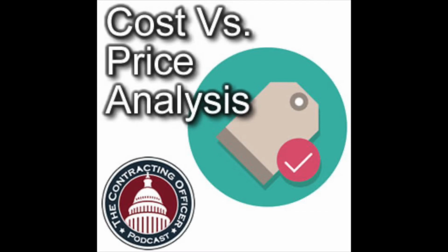15404-1B, lots of FAR in this episode. Price analysis is the process of examining and evaluating a proposed price without evaluating its separate cost elements and proposed profit. Super important. It's so important I had to highlight it in red and bold it, because you don't have to break out the cost when you're doing price. You just are looking at the top line.